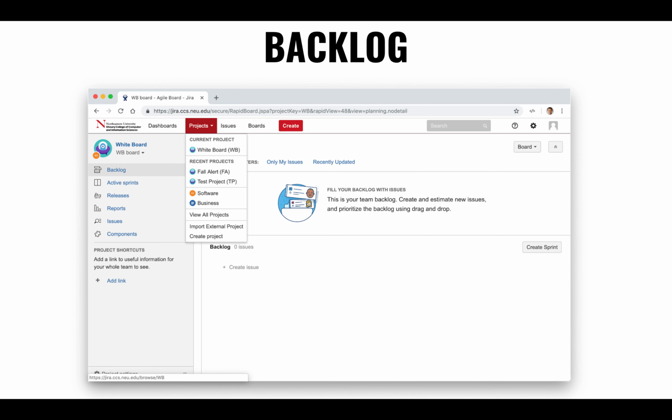Once we size it, we make sure that the sprint doesn't have more than X number of points. From previous sprints that we've done, perhaps we have found out that we can't really do more than 15 points per sprint. Right, at first, the very first sprint, it'll be very inaccurate. You'll be either way too optimistic or too pessimistic.